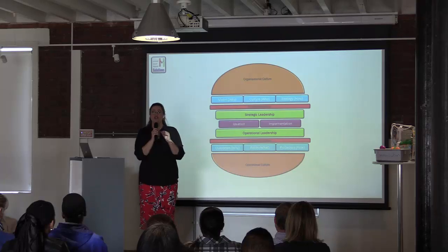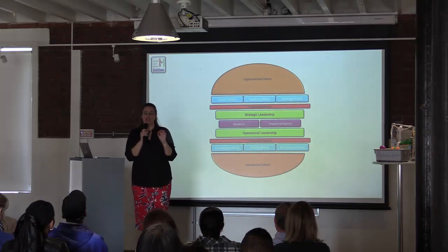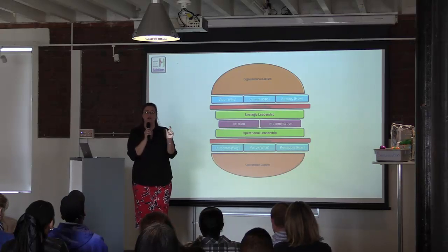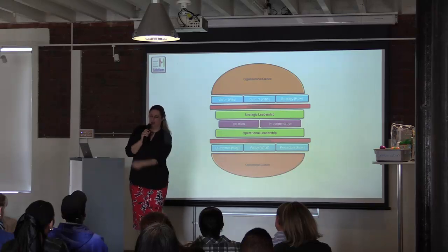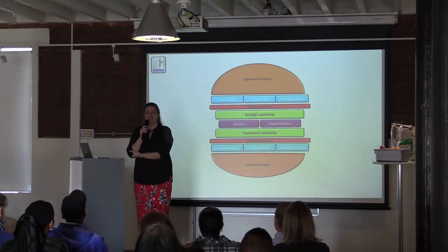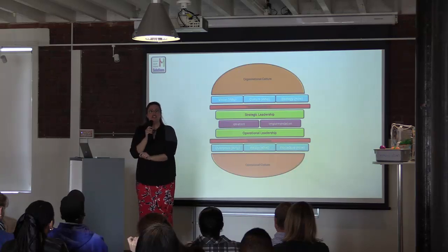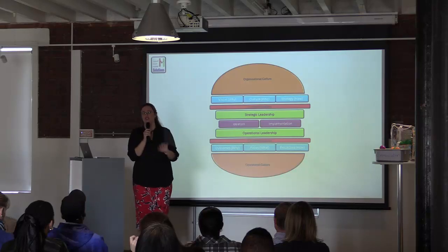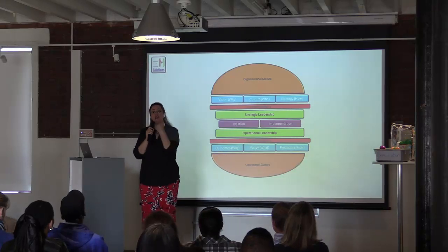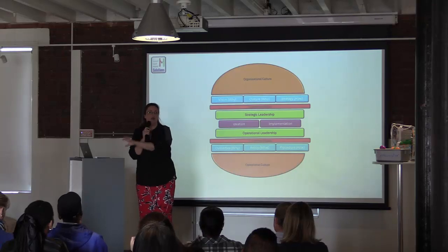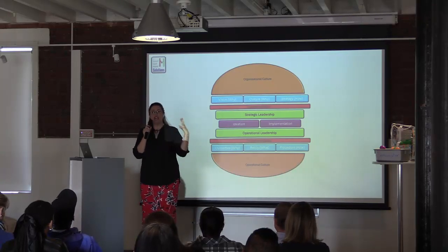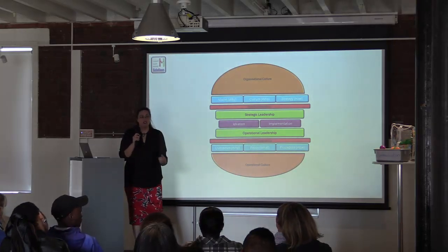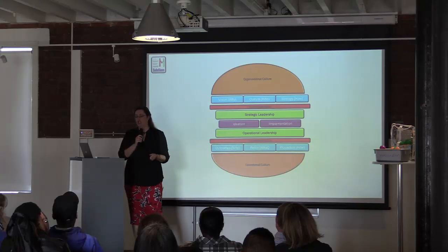So the finance manager used the tool very effectively recently when she had to do a report to the donor. And it comes up with a budget variance. And she's like, but we should have spent this money. Opens up Gantt, has a look at the activities, and sees that 3 of the activities are only scheduled for the second half of the year. Well, there you go. She types it in there. That explains the variance because she now knows what the program people know. And the program people know what she knows. And that communication bucket for them was very effective in solving and answering the questions that she has.